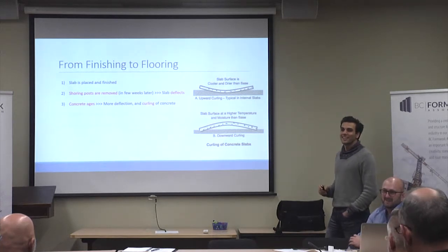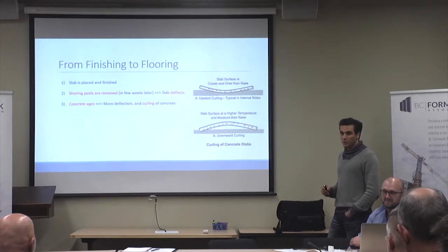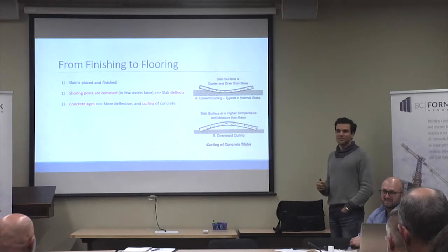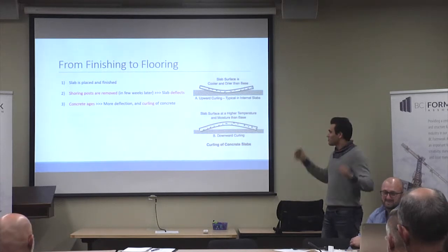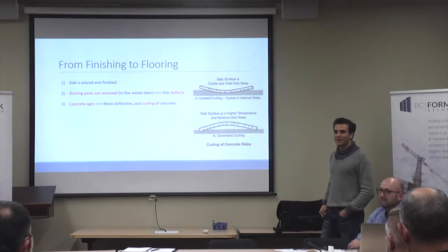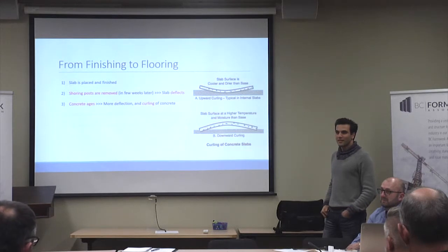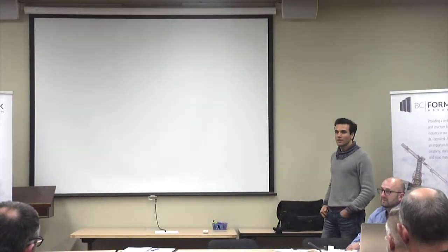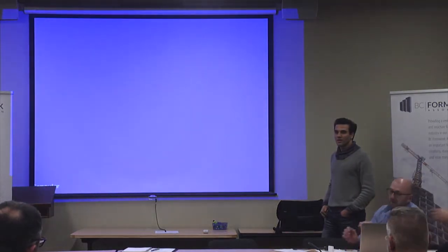It's usually not a few weeks, it's usually sooner than that. Oh, you remove the shores sooner than that? Oh, okay. It's interesting. But it's reshoring. On a typical tower, you would strip, say, 3 days later, but sometimes if you miss a cycle, you have to strip within 18 hours, 24 hours.